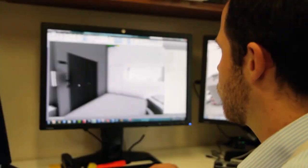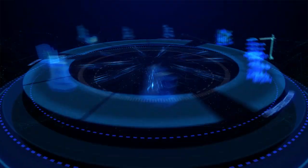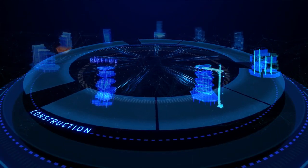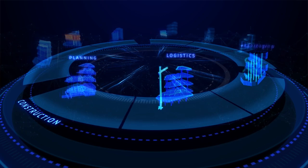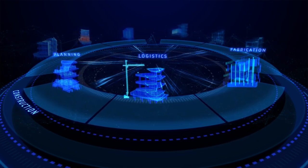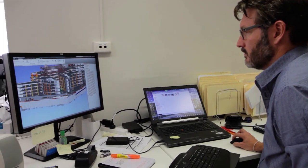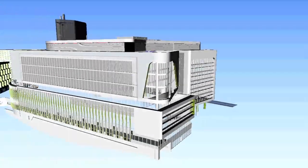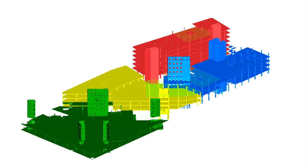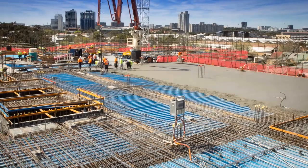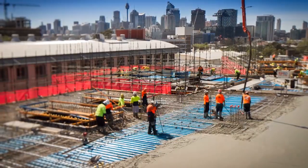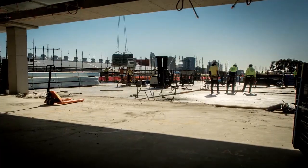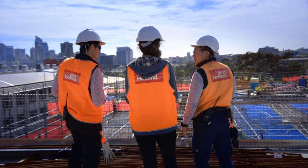In the construction phase, BIM provides a single point of truth. Work processes are streamlined and new levels of efficiency can be reached. BIM makes tasks such as construction sequencing understood by all, by allowing us to work out material ordering, fabrication, and delivery requirements ahead of time. By enabling detailed understanding through virtual modeling, BIM also helps to improve safety, increasing awareness during planning and construction.